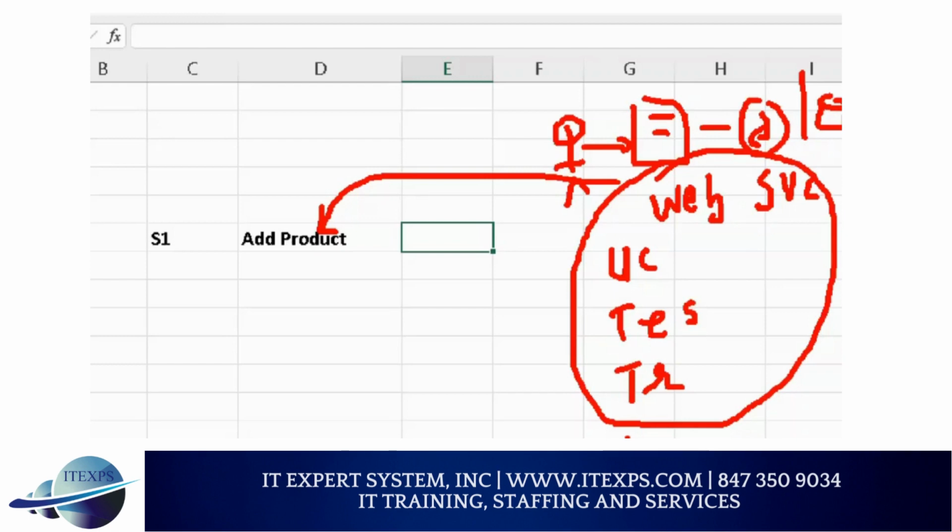If you do not know anything, just say, hey, I don't know anything. I want to learn. I can do a spike. Be a volunteer. Show that I want to learn. But every time a rookie team means people do not know anything. They will start with a spike. So they say, let's not start with the sprint first. Let's call a spike, which is called a 1 week spike. Everyone does research and then comes back and then they do sprint planning. This is called zero sprint. Speak with me.